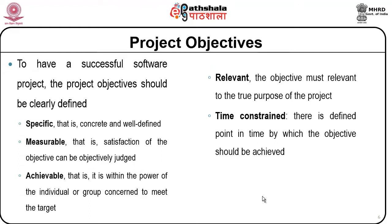To have a successful software project, the project objectives should be clearly defined, as this has an impact on quality. They should be specific — that is, concrete and well defined; measurable — satisfaction of the objective can be objectively judged; achievable — within the power of the individual or group concerned; relevant — the objective must be relevant to the purpose of the project; and time-constrained — there is a defined point in time by which the objective should be achieved.